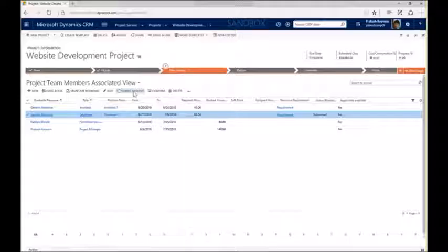They can look at it, look at what I've said in there and say, hey, I think this person is good, and I'll tentatively book that person to the project for you, and then I can look at that and say, yep, I think that sounds good. So using that request process helps me either pass that on or have a more centralized resourcing function if that's my business model around resourcing.